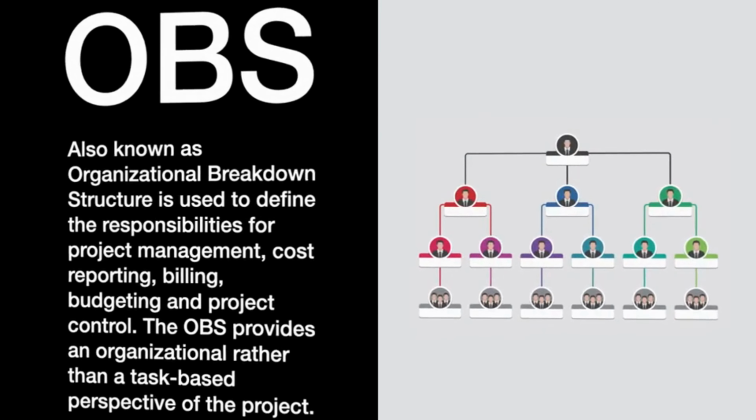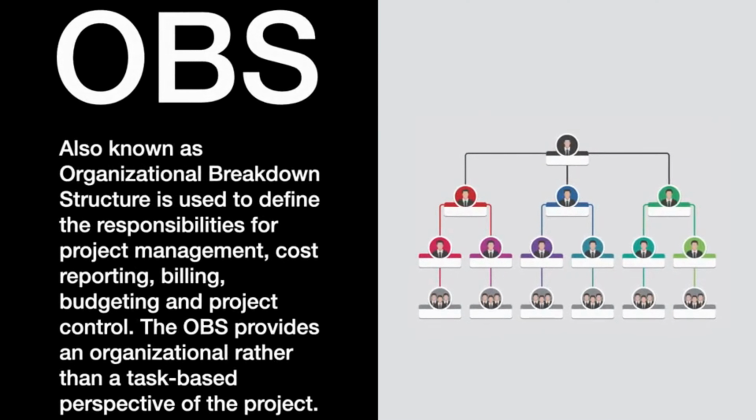OBS, also known as Organizational Breakdown Structure, is used to define the responsibilities for project management, cost reporting, billing, budgeting, and project control. The OBS provides an organizational rather than a task-based perspective of the project.